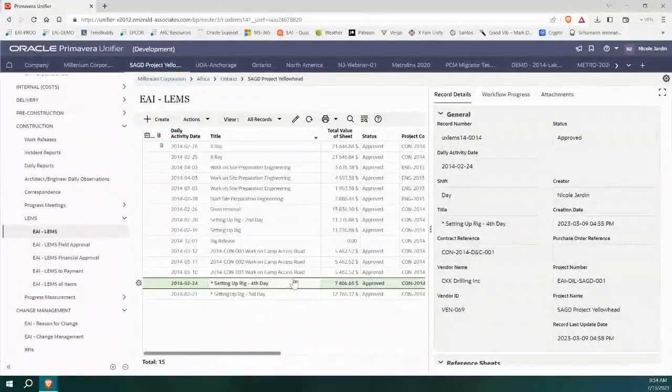Okay. Now, if you're working on a lump sum job, you still want to do this tracking. But then what you do for your invoicing is you put a % complete against it. Okay, so that's the extra piece if you're doing lump sum work.